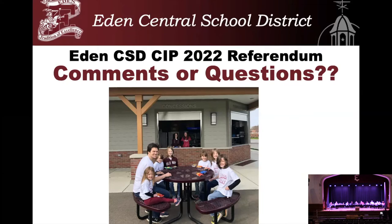There was just a recent public vote that was successful just last week in the area, from the community standpoint. And SED is still working remotely. They are starting to come back into the office full time, and they're still approving plans and getting them through the system. I know on our last capital project, it was something like 9 months.